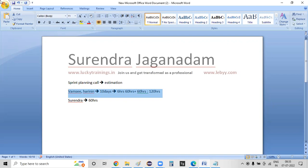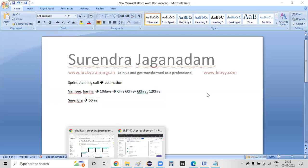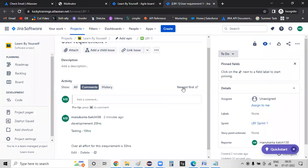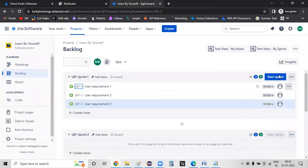Story by story you can add your efforts and make tasks for 120 hours. You can estimate every story, record it, and then start the sprint. After estimation, you start the sprint.